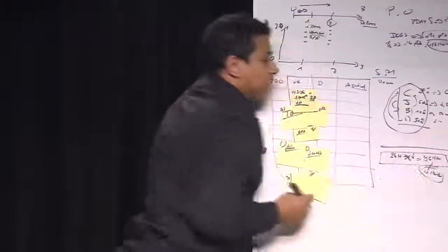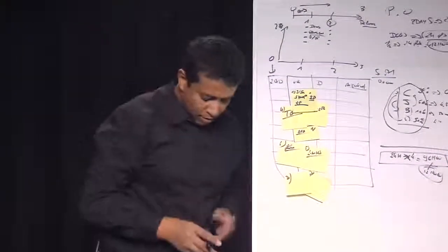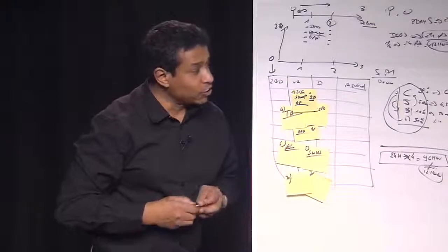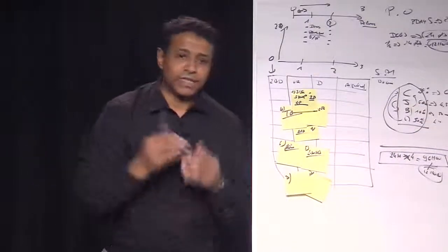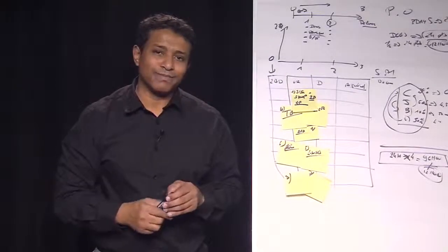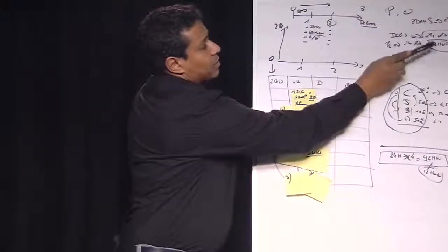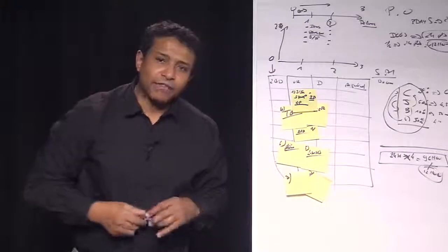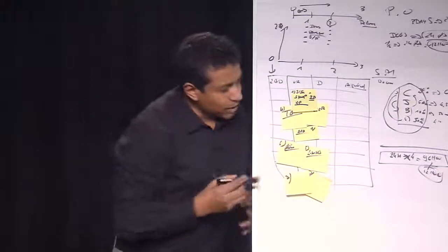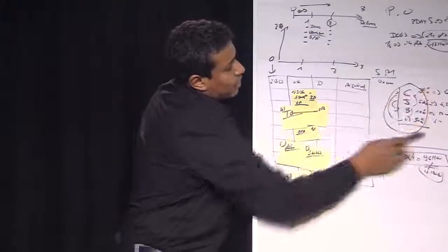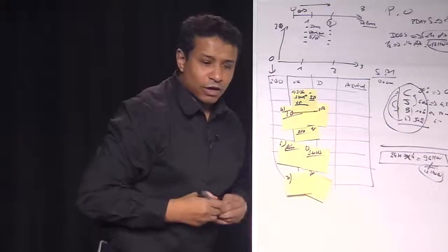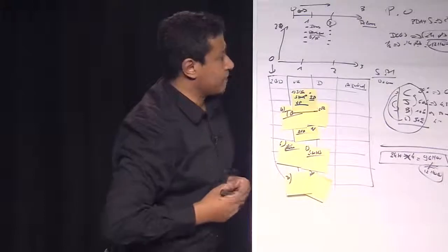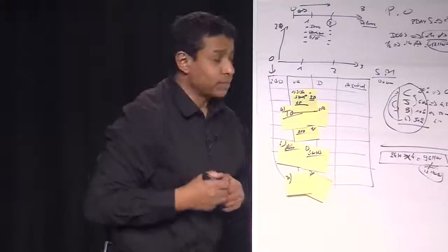So to estimate the velocity of my company, of my dogs, I have to do this exercise. How much time can you give to the project, and how much time do you have, so that you can compare the time of your team and the time that can be delivered to this project. This is the first point.